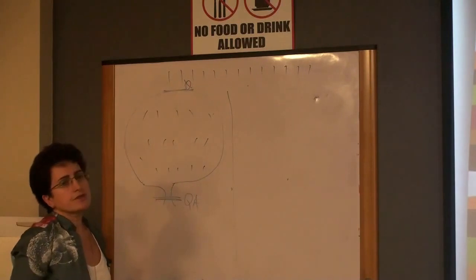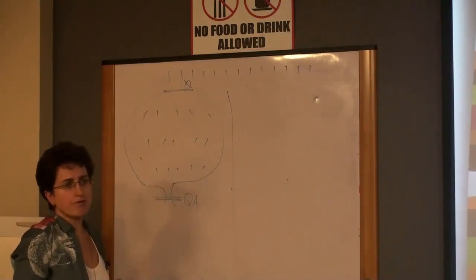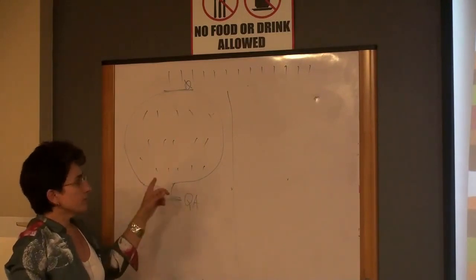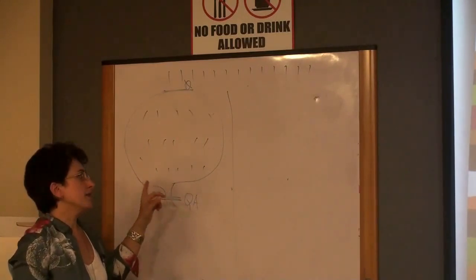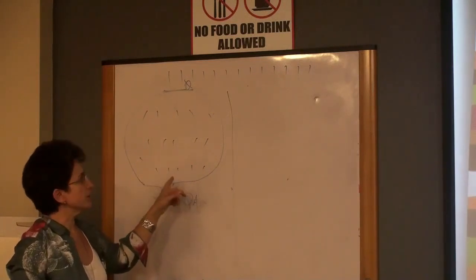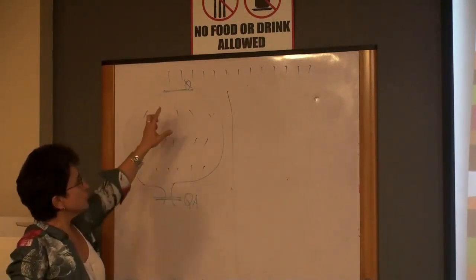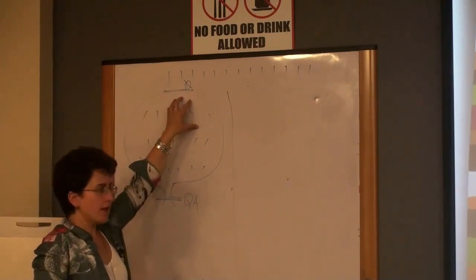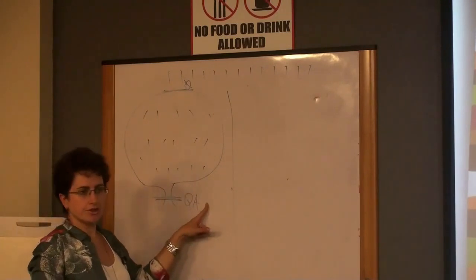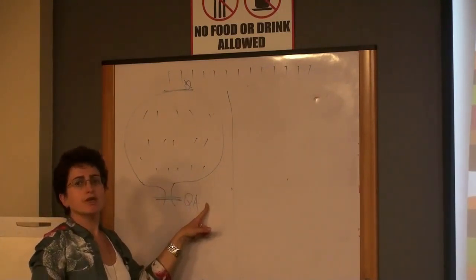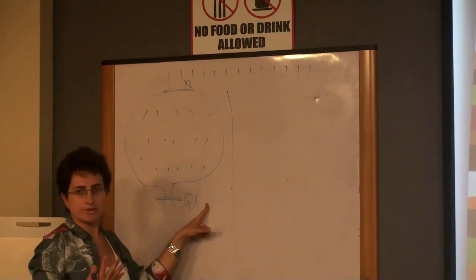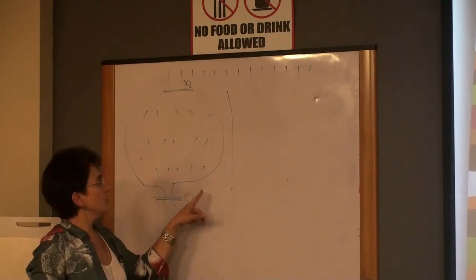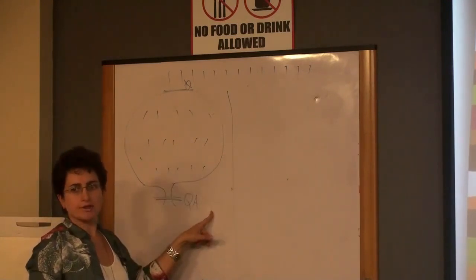For many projects, this approach historically was found to be inefficient. And people found this by experience. The reason for this approach being inefficient is that when you do not evaluate the quality of your product for a long time, then you will find critical issues at the end, right? You may find some fundamental design issues at the end, and then you do not have time to react to those bugs in an appropriate manner.